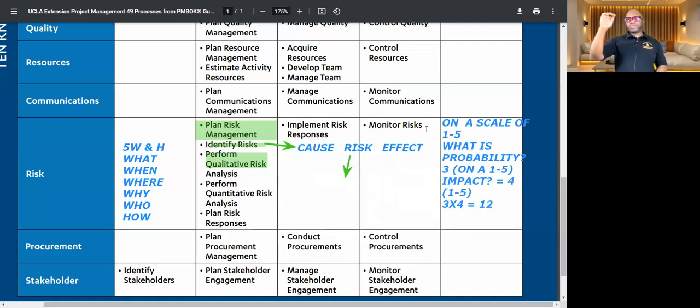So you're going to score all of the risks, that's a qualitative risk analysis. You score all of them, and then you rank them. And then you have some risks that are bigger than others. For those that are significant, or those that your company has decided, oh, we're going to take action on anything above a 12 or anything above a certain threshold, then you go a step further in some companies and you do a quantitative risk analysis where you look at the monetary impact.